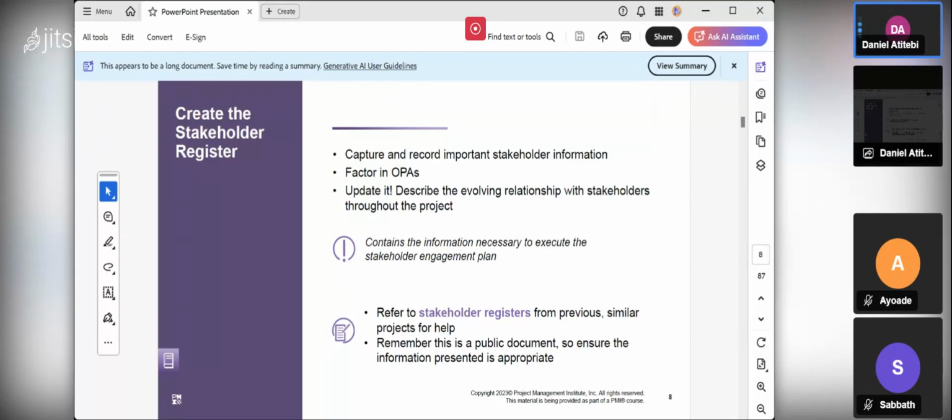So you are going to strike their name out of it. Any new stakeholder that you identify while you are managing your project, you need to add to that stakeholder register. So that means you keep on updating it. Any stakeholder that has left the organization, maybe a team member who has gotten a better job somewhere else and resigns, what do you do? You strike the information out.